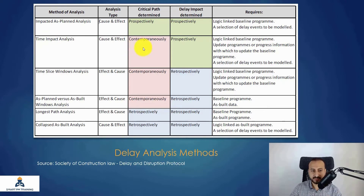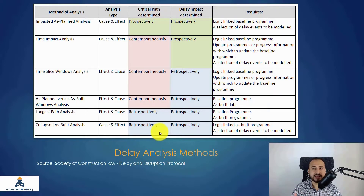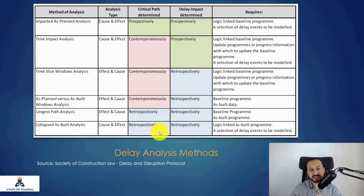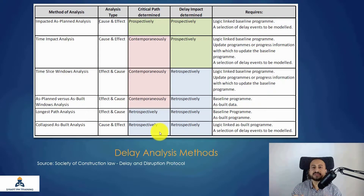Collapse As-Built is retrospective — the opposite of prospective. At some point in time, a schedule update shows three months of delay in the project, and because we are dealing with actual data, actual dates, and actual percentages, it is hard to clearly tell how those three months of delay occurred. For retrospective analysis, you do not forecast event impact; rather, you investigate the as-built information — original versus actual durations, actual versus planned dates, logic maintained, and schedule logic changes.